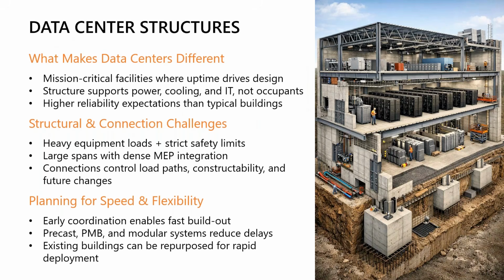And from a construction point of view, this is where planning really matters. Being able to have that early coordination between your structural, mechanical, and electrical teams can lead to fewer RFIs or even late stage fixes that might have been overlooked throughout the project.